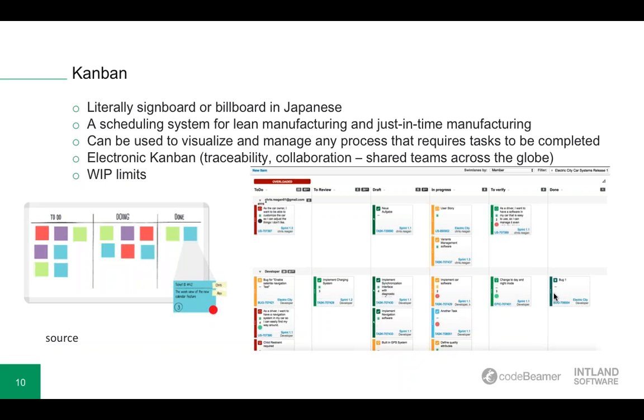When Kanban is adapted to software development, it usually starts with a board and visual cards that represent items in your product backlog. On the board, you place the cards in the columns that represent their current step in their workflow, ranging from new to complete, and the other steps in between in the workflow are up to you to determine. This visualization gives you a good overview of what is in progress, already done, and what is going to be worked on next.